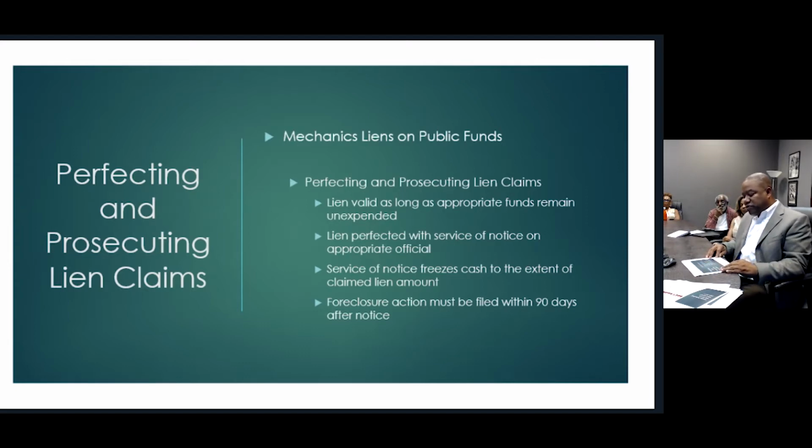Lien perfected with service of notice on the appropriate official. I want to stop there for a second, because sometimes if you're the subcontractor, you may not know who the appropriate official is, but there's a way to determine that, and you can determine that by filing what's called a Freedom of Information Act request, and where you specifically ask,